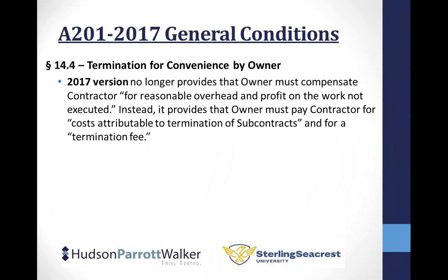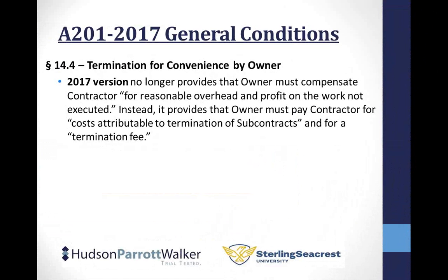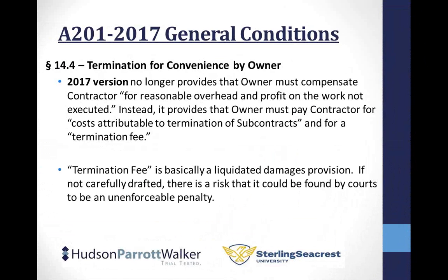The one caution that I give you is that because it's a termination fee, it's basically a liquidated damage provision, which you're familiar with in terms of delays, right? And the standard for liquidated damages is simply some language that you need to put into the termination fee that is similar to what you see in the liquidated damages. And that language is going to say that it was difficult to estimate, but it's been reasonably done, that type of language that is in every liquidated damage provision you've ever seen, and you've skipped right by it because it looks like a lot of lawyer blah, blah, blah. It actually has meaning to the courts, has no meaning to you. But it has meaning to you here because you want the same language in the termination fee, okay?